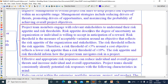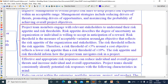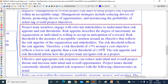Project team members engage with relevant stakeholders to understand their risk appetite and risk threshold. Risk appetite describes the degree of uncertainty an organization or individual is willing to accept in anticipation of reward. Risk threshold is the measure of acceptable variation around an objective that reflects the risk appetite of the organization and its stakeholders. For example, a risk threshold of 5% around a cost objective reflects a lower risk appetite than a risk threshold of 10%.